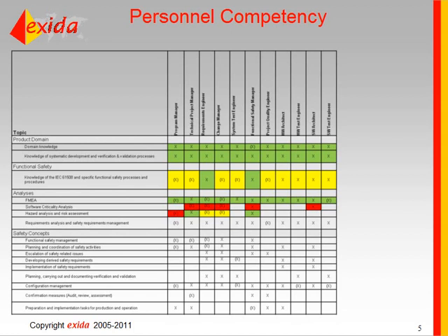And so in any case where there's yellow or red, you would then have a plan to say this person needs to have some training in a certain area, or this person might need to have a mentor work with them on the project, someone who can train them on the job or review their work as they go along. So it doesn't always have to be formalized training. It's just some way to make sure that they achieve that competency, or somebody's able to review that they're meeting that competency.